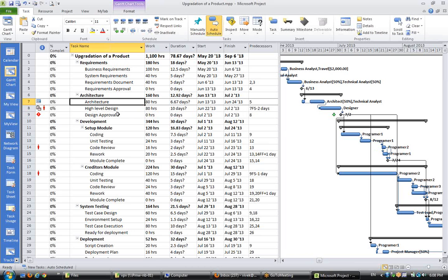So a baseline is an important thing, because that is the approval, as I think as mentioned, that it is an approved plan. This is a plan which we will track, and we will not make modification in this plan until and unless there is a change in the scope. Only one condition, there is a change in the scope, otherwise baseline cannot change. It has to be firm.